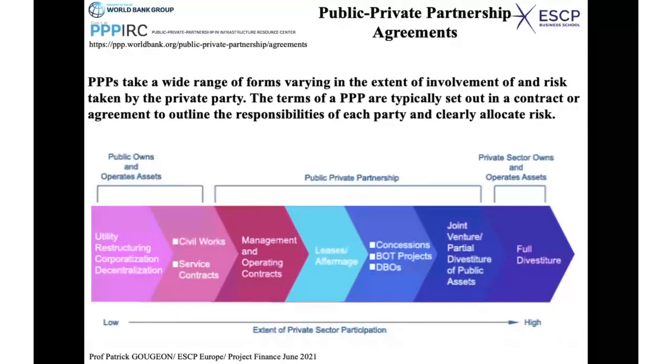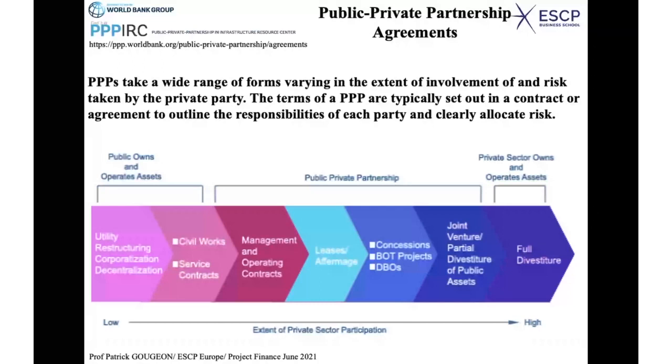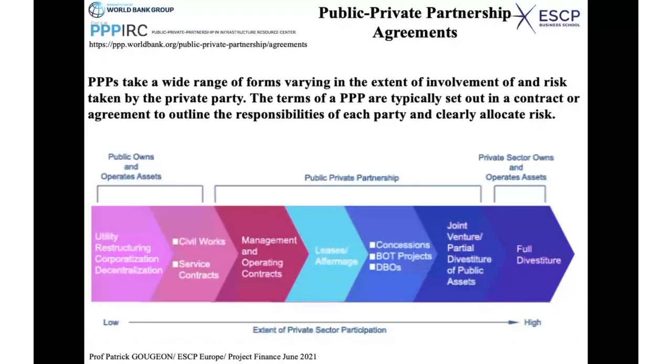What is DBO? DBO stands for design, build, and operate. Then the private sector will just design, build the infrastructure, and operate, without owning in this case. With BOT, I would say there is a higher involvement of the private partner, because the private sector will build, operate, and transfer later on.